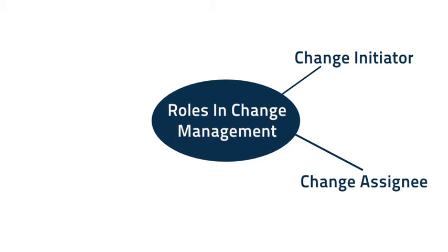Change assignee can also be the change initiator. Change approver, the manager or director who is responsible for reviewing and submitting the change to the change control meeting for approval. Also responsible for representing the change request in the IT change control meeting. Change approver cannot be the change assignee.